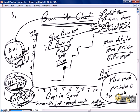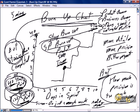You could choose to do two burn up charts: a number-of-stories burn up chart for other interested parties, and a story point burn up for the team. It should take five minutes a day to complete the burn up charts at the end of your daily Scrum. So at the end of today's Scrum, how many stories did we get done? Directly relate that to story points from the original estimate. And Fred, you're still working on story number 93 — how are you doing? You think you've got three of the five story points done? Perfect. As long as you can get the story point burn up information easily from your team, there's tremendous value. Pick the method that's going to work best for the burn up chart to suit your needs.